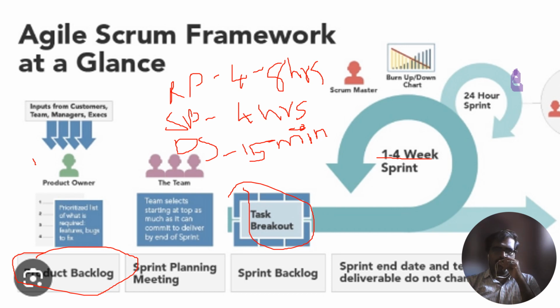This learning is documented so we can improve our process or the way of working in later sprints. The time box for the sprint retrospective meeting is 1 to 3 hours. As a thumb rule, it goes for 45 minutes per week of sprint length. For example, if the sprint was for 2 weeks, then this meeting goes for about 1.5 hours.